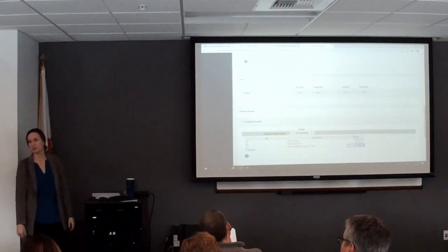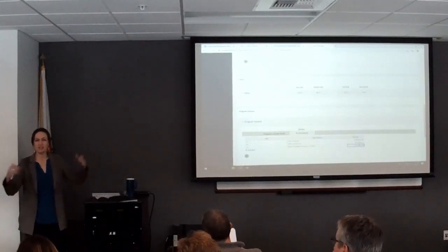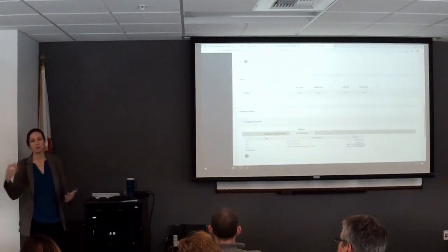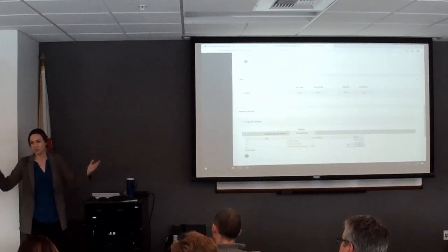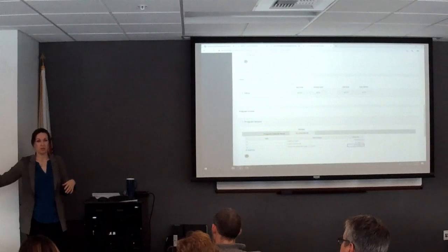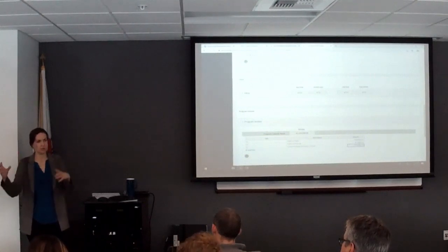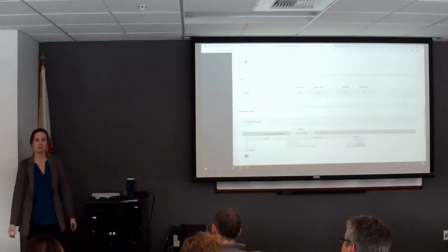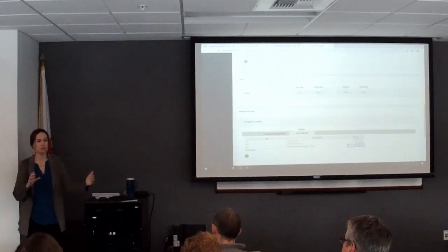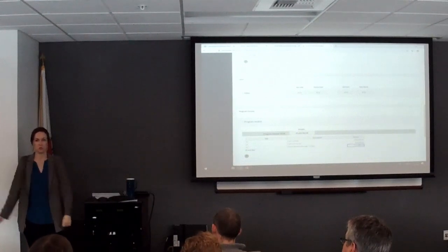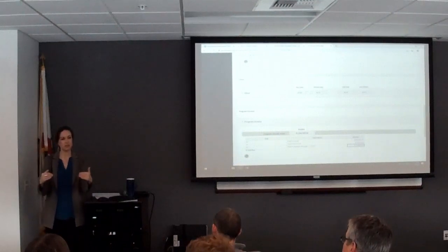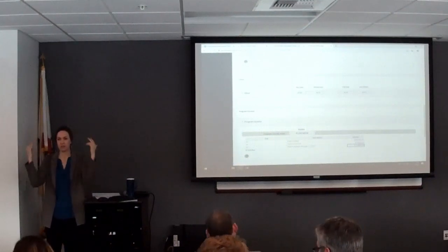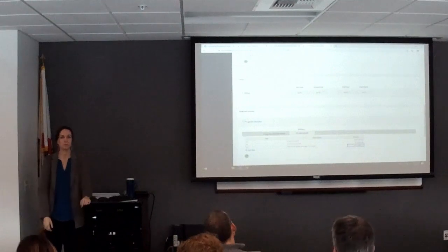So, for Terry's project, if she had done this and we scaled it back, said, we only have 1.5 million in grant funds, she can now use her projected receipts to continue to carry that project on. If you're doing a project that has discrete locations, add additional locations so that you can say, here's how much we have funded, but if we get program income, we're gonna do this much more. If you're doing a project, dial it back to your basic engineering standards, say, here's what we'll add in gold standard if we get program income.